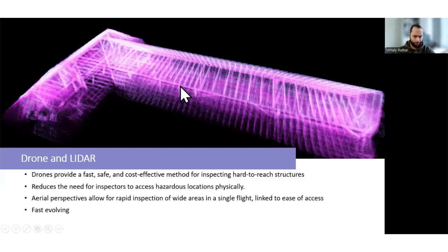Now, the image you see here is from a job where a timber inspection had to be performed. And the use of drone here cut down site inspection time from 1 week to just a single day due to the speed and clarity the drone could achieve, not to mention the ease of access. No one had to wade across questionable timber joists and risks falling through the roof.